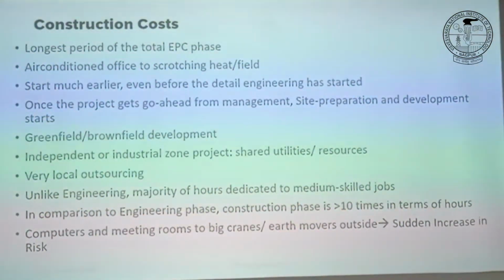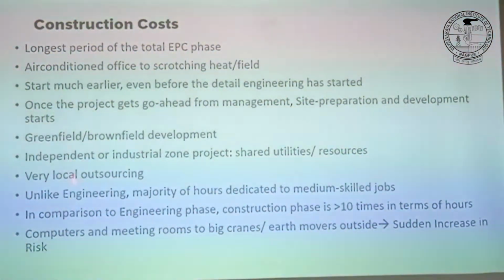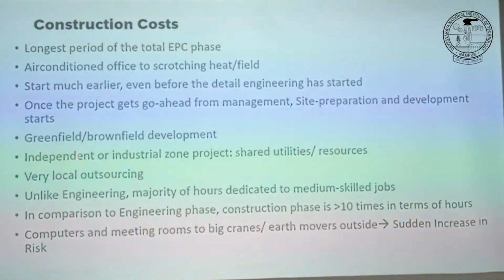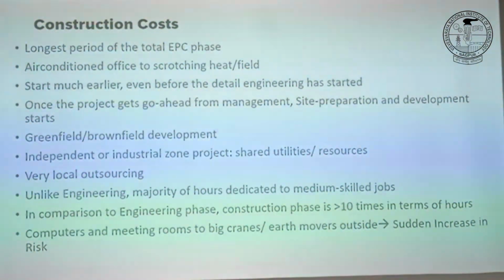So engineering you can do anywhere. We are sitting here in India, and we can ask a company in Germany or in US to do the engineering, right? But construction is very local because you need local know-how, local expertise to do your construction. So you have to engage with local companies. Sometimes some sort of engineering or calculations you can do in-house, but for sure construction never. It's a very, very, very specific job.